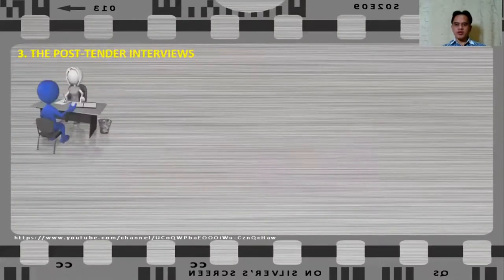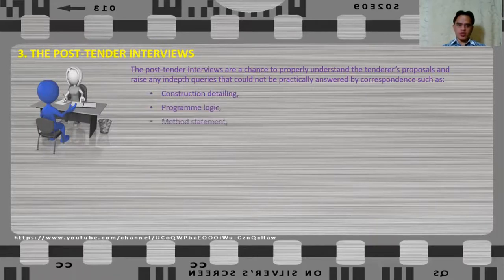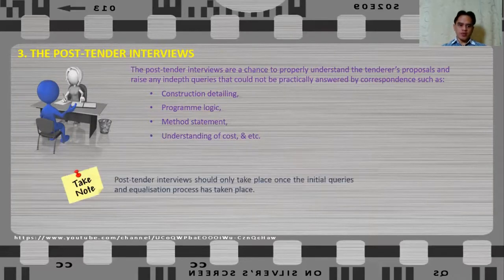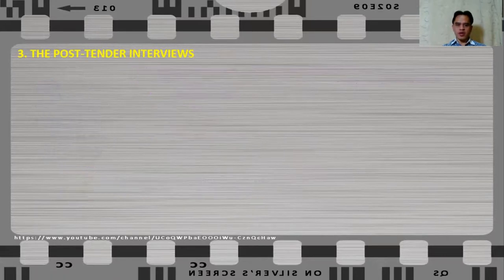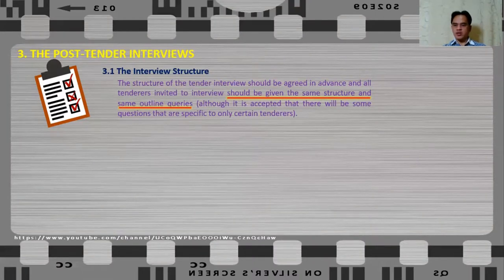Post-tender interviews are a chance to properly understand the tenderer's proposal and raise any in-depth queries that could not be practically answered by correspondence, such as construction detailing, program logic, method statement, and understanding of cost. Post-tender interviews should only take place once the initial queries and equalization process has been completed. To prepare, first agree the interview structure in advance — all tenderers invited to interview should be given the same structure and the same outline queries, although some questions may be specific to certain contractors.